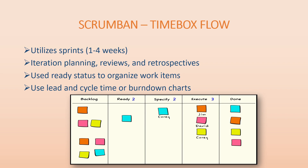The second type is Scrumban Time Box Flow, where we have sprints lasting from one to four weeks. It includes sprint planning, sprint review, and sprint retrospective meetings. Work items are organized using a 'ready' status. Key metrics include lead time, cycle time, or burndown charts — burndown charts show how many story points remain to complete the project.